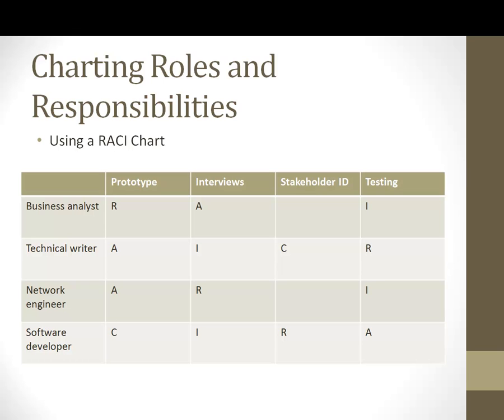Now, one approach to communicate those expectations is to create a responsibility assignment matrix. One of the most common types is called a RACI chart. RACI, R-A-C-I, means responsible, accountable, consulted, and informed.